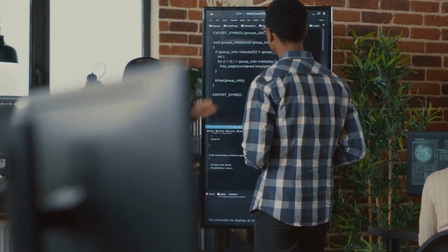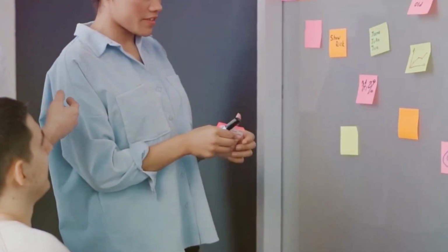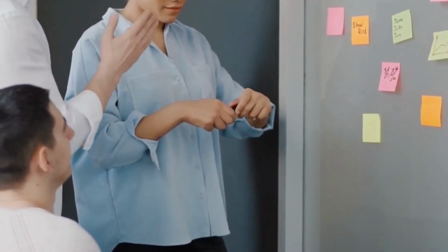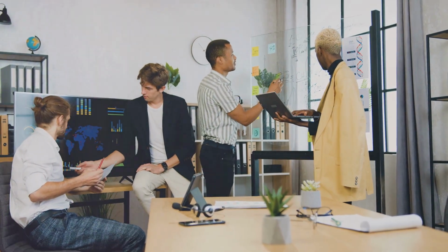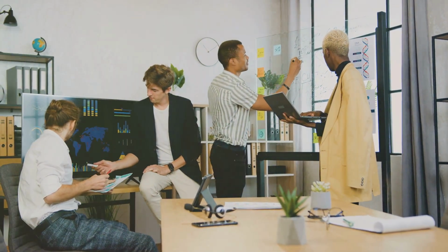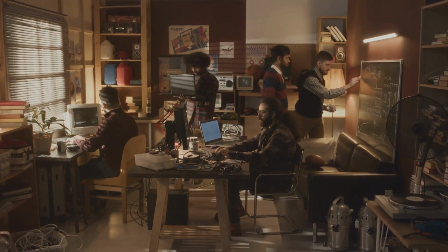Backlog refinement is an ongoing collaboration between the product owner and the development team. During refinement sessions, stories are clarified, acceptance criteria are added, and large items are broken into smaller pieces. This process helps ensure that backlog items are ready before they enter a sprint or development cycle.